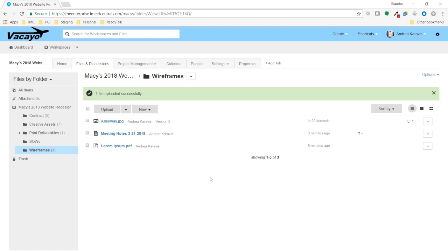To view a list of project timelines and tasks within a workspace, you're going to go to the Project Management tab. The Project Management tab, by default, has 6 options. There is a Project Overview page, a Tasks and Milestones page, a link to quickly see tasks that are assigned to you within this workspace, a milestone list, an interactive Gantt chart, which you can use to slide project timelines around, which is really nice, and a status report. You are likely going to spend most of your time in the tasks and milestones area.